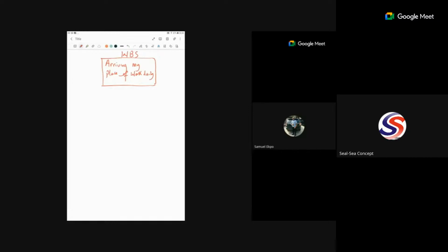So what work breakdown structure preaches is that everything that you will do in your project will be broken down to the list of it that you cannot further break down again. It is only when you are able to do this that you will see the smallest task to be carried out in the course of the project. And then you begin to attach the time frame to them one by one. And then, attaching the time frame to them, you begin to attach the resources that they will take.